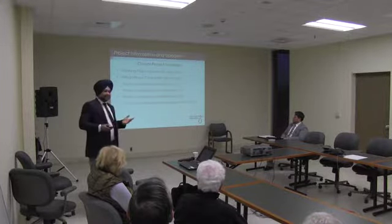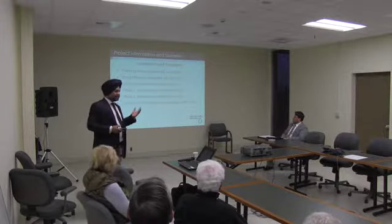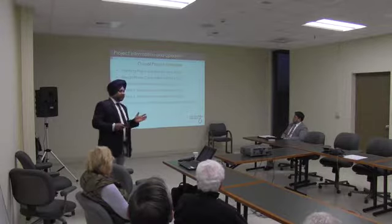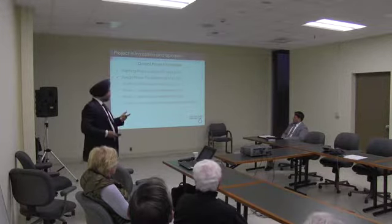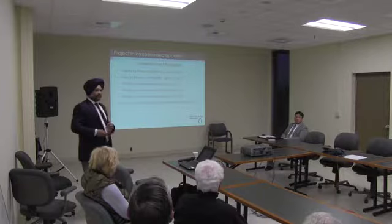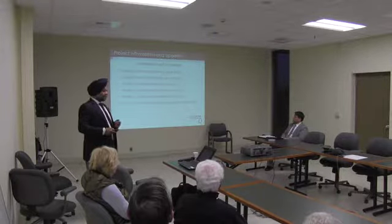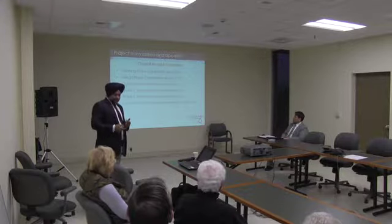Since this is an operational plant and we need to continue the service to the customers, the construction phase was divided into five phases. Phase one was completed in September of 2015, and phase two is scheduled to complete by fall of this year. The overall project is scheduled to complete by winter 2020.